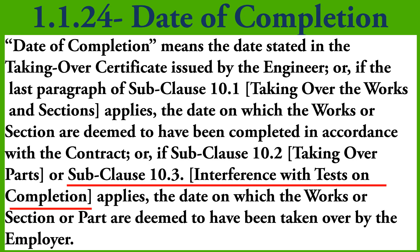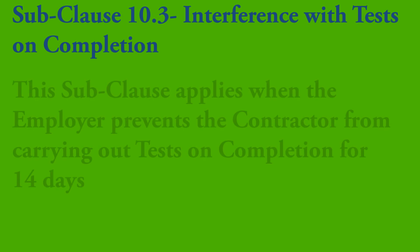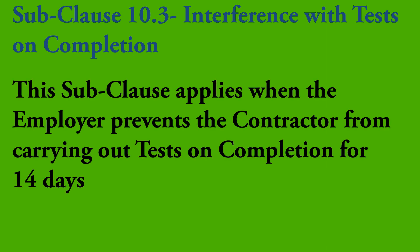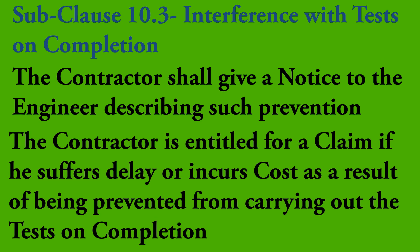The final sub-clause related to Date of Completion is sub-clause 10.3, Interference with Tests on Completion. If the contractor is prevented by the employer's personnel or any cause for which the employer is responsible from carrying out the tests on completion for a period of 14 continuous days, or a cumulative 14 days in multiple periods, then the intended date for completion of tests on completion becomes the Date of Completion, and the engineer shall immediately issue a Taking Over Certificate. The contractor shall give a notice to the engineer describing such prevention, and if the contractor suffers delay or incurs cost, the contractor shall be entitled to a claim subject to sub-clause 20.2.